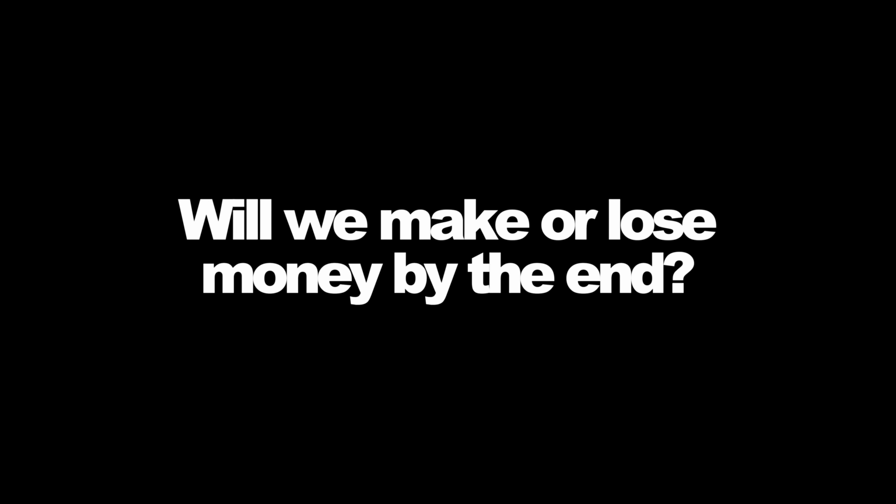And then it asks a second question. By the time the project finishes, are we likely to make or lose money? That is why CVRs matter so much. A project can look busy on site, it can feel like it's going on well, and still be losing money in the background. So a CVR is the document that will help expose that.